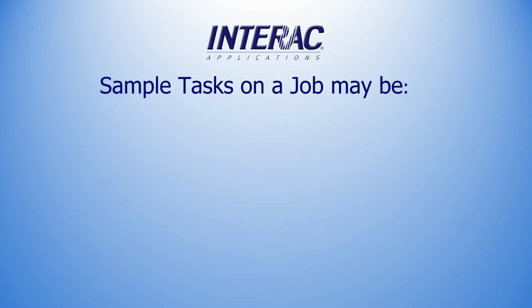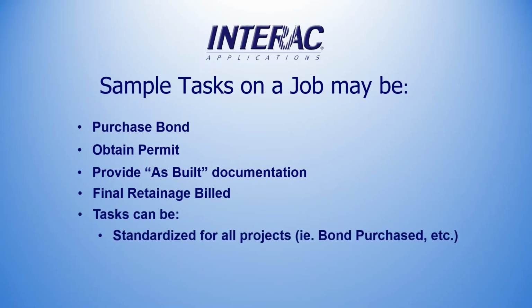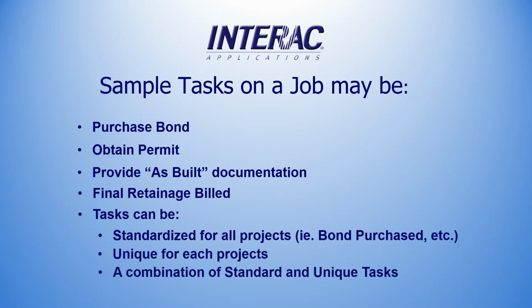Sample tasks on a job may be purchase a bond, obtain a permit, provide as-built documentation, final retainage bill, and so on. Tasks can be standardized for all projects, such as bond purchased, unique for each project, or more likely, a combination of standard and unique tasks.